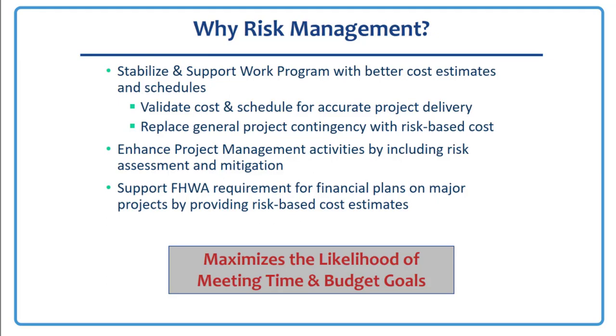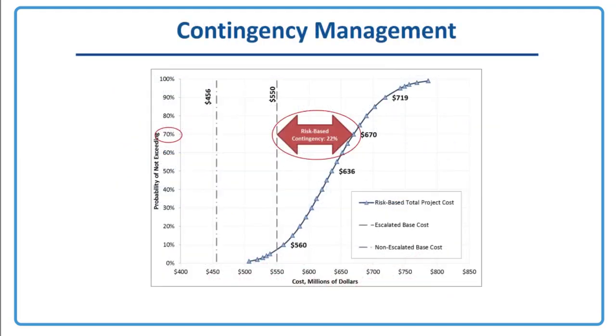We enhance project management activities by including risk assessment and mitigation in your project meetings, and also support FHWA requirements for financial plans on major projects by supporting the financial plans with a risk-based cost estimate. And in general, it just maximizes the likelihood of meeting time and budget goals on your project.